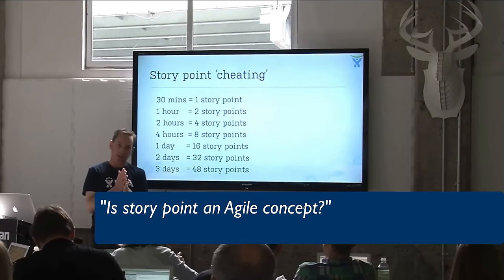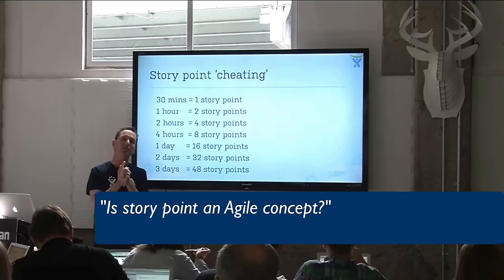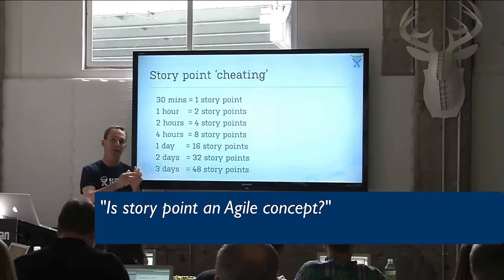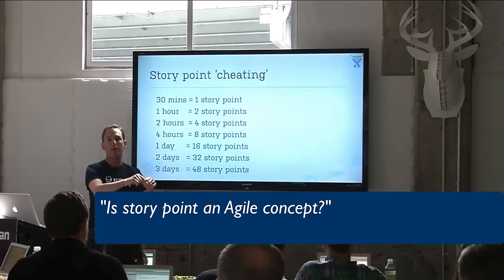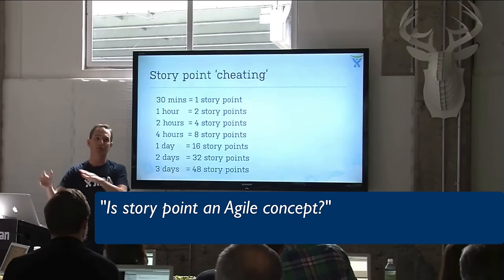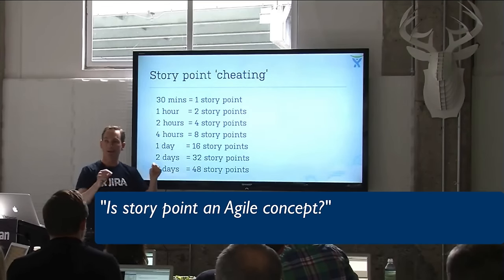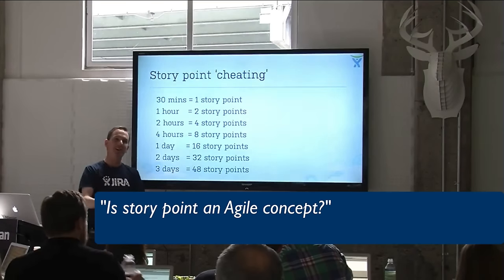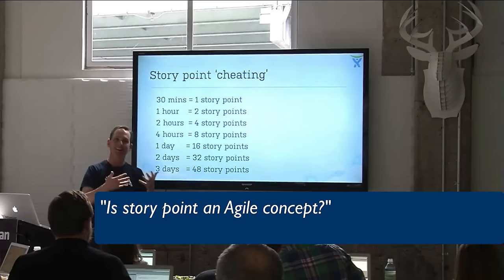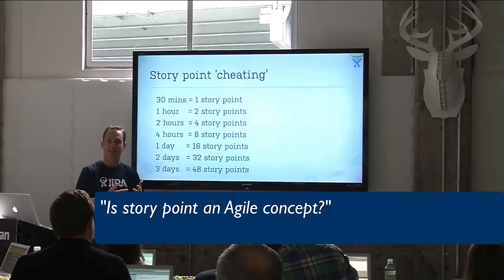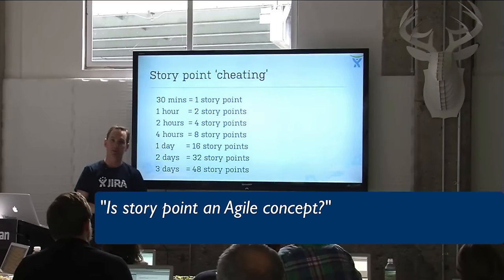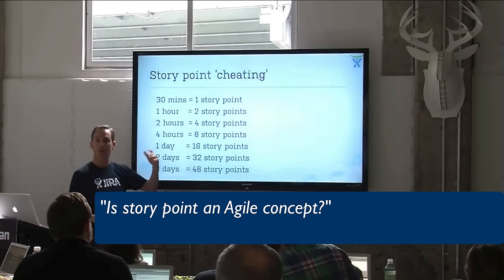Story point is an Agile concept. What they tried to get away from is hour estimates, because as soon as you say a task is going to take two hours, then you do time tracking and it takes two and a half hours, somebody looks at that and says you're working too slow. So they tried to make an obscure number that was harder to translate, so that when people were first estimating, it didn't turn into something that bosses used to judge performance. That's why it's deliberately obscured from hours.